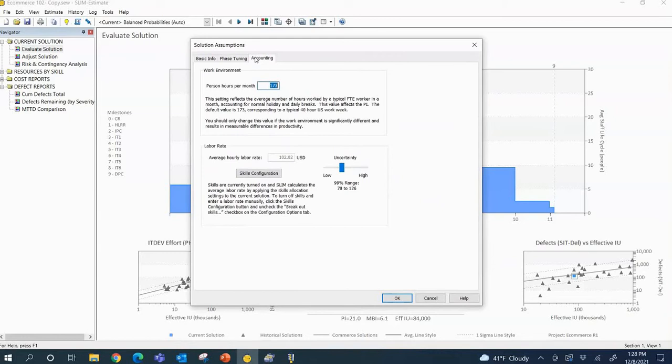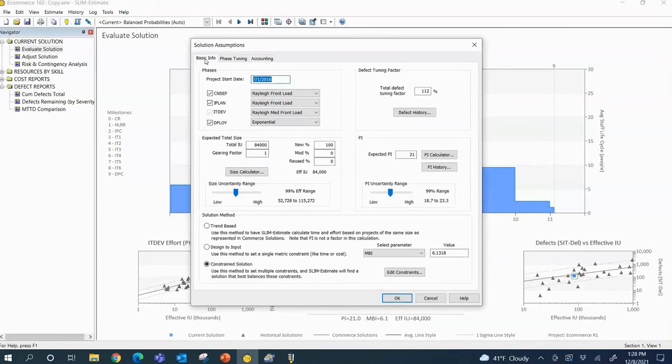I'm going to put in a labor rate, an average labor rate for the overall program, or there's another area in the tool where I can break everything out by role by month. Different labor rates by different roles or different countries or whatever I need to reflect within my project environment. And then I'm going to make a decision. I can run an estimate based on industry.